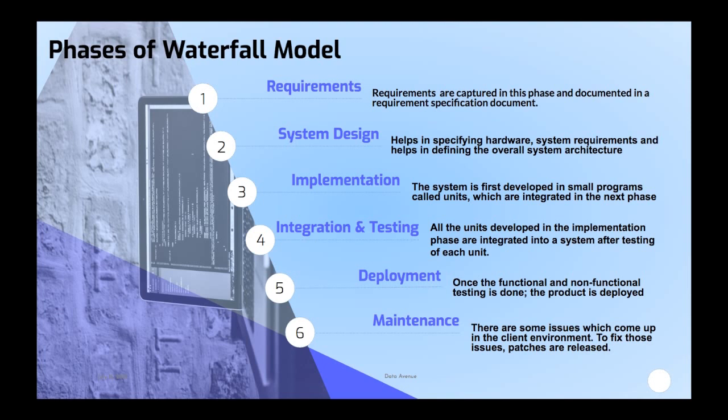In the implementation phase, modules are divided into small units which are coded and tested individually — that is unit testing. In the fourth stage, all the small modules are integrated and end-to-end testing is performed. After that comes deployment, where the system goes live with real-time production data, followed by the maintenance phase.